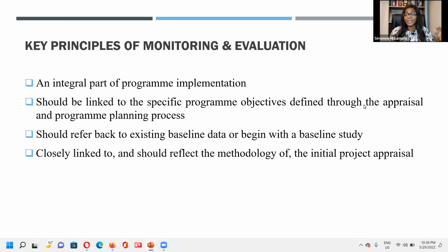Many times we identify a need and we decide, I'm going to come up with a project. But as much as you wish to come up with one because you see people don't have food, it is always important to do a baseline study or baseline research. Some would do feasibility studies or research studies just to find out what the target population's need is, what the individual issues within are.